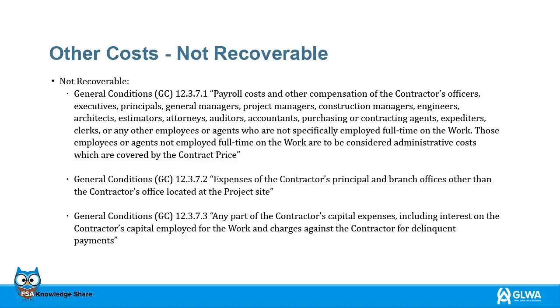12.3.7.2 Expenses of the contractor's principal and branch offices other than the contractor's office located at the project site. General Conditions 12.3.7.3 Any part of the contractor's capital expenses, including interest on the contractor's capital employed for the work and charges against the contractor for delinquent payments.